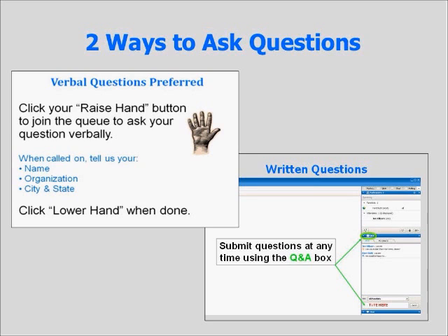I don't know. Stan, do you have any wisdom on this? Only other thing, what you alluded to was whether or not the development could be scaled back to something smaller, because it looks like the entire construction cost didn't come through for funding. I don't know if that was a grant or a competitive application, so whether it's possible to scale it back. And then, if I understand the last part about benefits and costs of either activity, there are costs for maintaining land. If it does flip to a land bank, you've got to decide how you're going to handle mowing expenses, ongoing holding costs of land banks, and how you would try to deter dumping on the site, and things such as that. So there are costs to having a land bank.